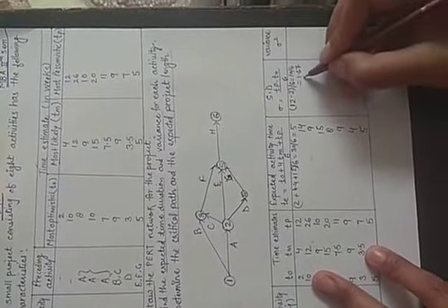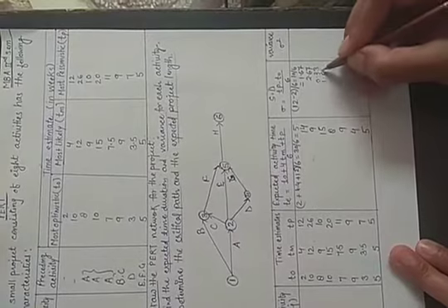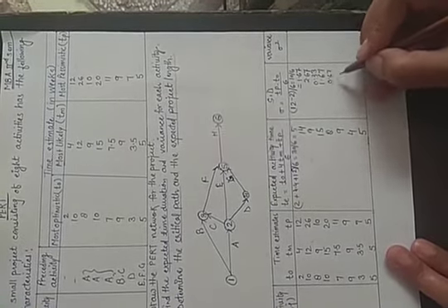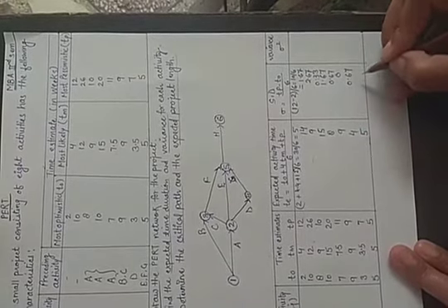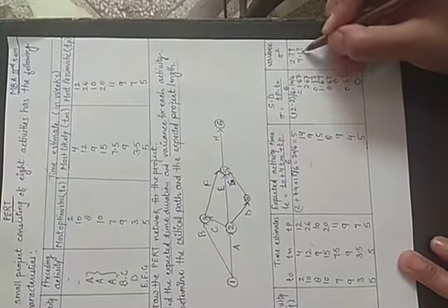Similarly you will all calculate, then it will be 2.67, 0.33, 1.67. Next is 0.67, 0, 0.67 and 0. Variance is the standard deviation whole square. 1.67 whole square will be equal to 2.79. Similarly you will do all, then it will be equal to 7.13, 0.11, 2.79, 0.45, 0, 0.45 and 0 square is equal to 0.